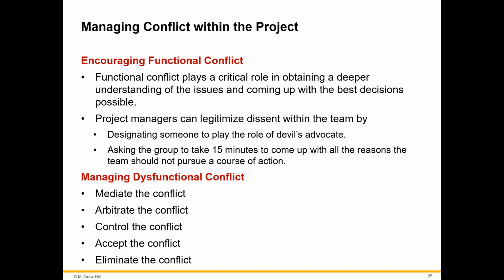When we look at the devil's advocate, the person will basically give you some advice and ask what do you think about it, and then see what the reaction of the group might be. You also want to ask the group to take maybe 15, 20 minutes or so to come up with all the reasons that the team should or should not pursue the course of action.